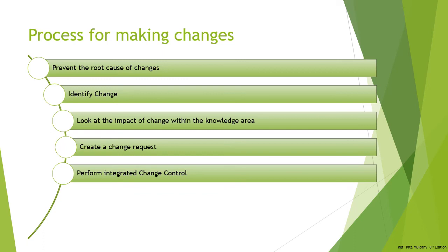Assess the change. You need to see if the change falls within your project charter. The requested change may be an entirely new project, right? So there may be a change request from one of the stakeholders which is not at all related to your current product definition. So it can be an entirely new project, so you need to very carefully assess your change requests.